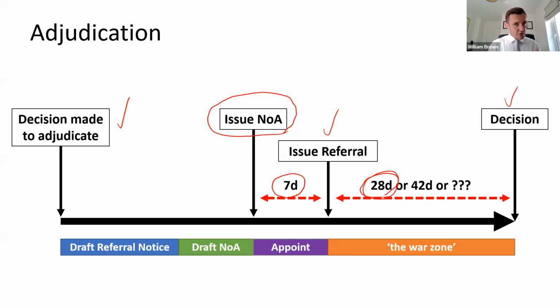Adjudication is a very, very straightforward process. There's no trial. You don't get to stand up and give your evidence orally. The adjudicator might ask for a meeting perhaps, but it's very, very unlikely to happen. And all of these key points have to be considered within that very short time frame, 28 days. The 28 days can be extended by agreement up to 42 days or even beyond that in certain circumstances. But aside from that, it's a very, very straightforward process, and it is not the same as arbitration, and it is certainly not the same as court.